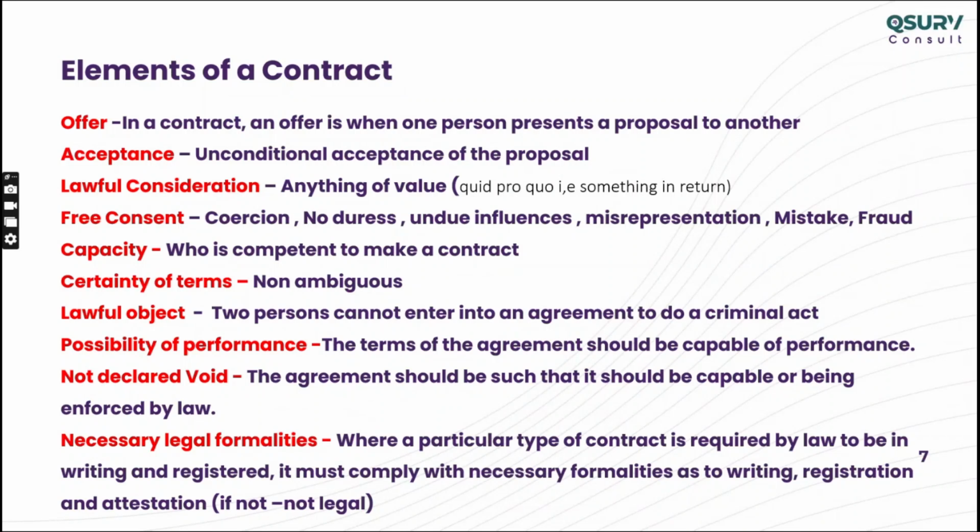If you are an employer, your offer has to be communicated to the contractor through a proper channel, could be a text, could be a mail, or any other mechanism. If it is a company, you have to communicate the offer to the right person who can take decisions, or who has power of attorney. The offer should be addressed to him.